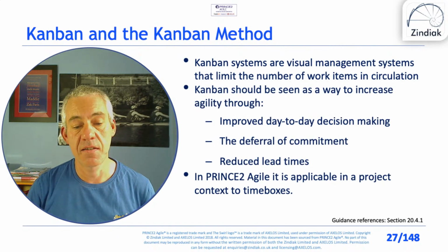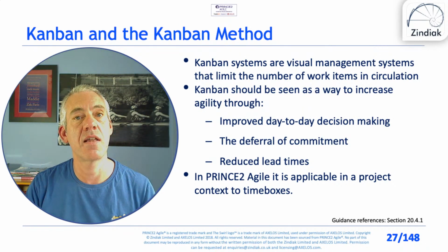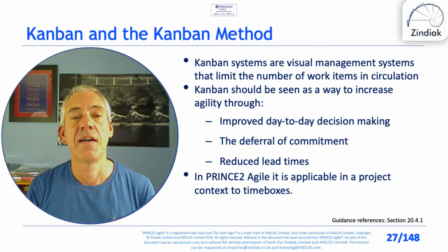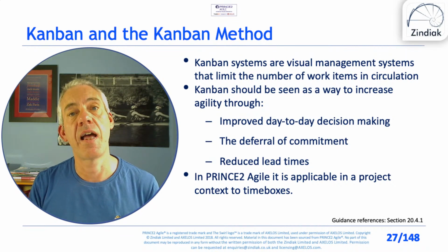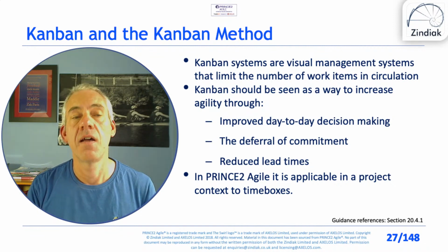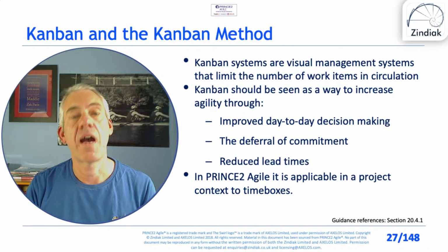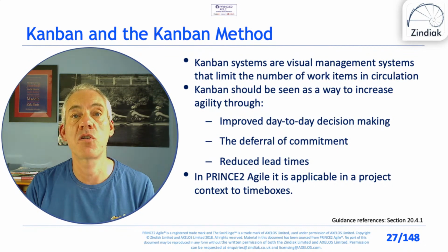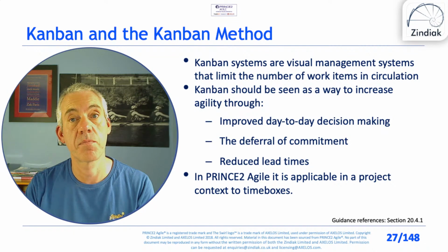Right, yeah. So that is Scrum. As I said, Scrum is the most popular framework within Agile. Undoubtedly, it's the core of the time boxed technique. Do pay attention that when you have a time box, you set a goal for what you're going to deliver in that time box. You don't extend the time box, and if you need to, de-scope to make sure you deliver something of value